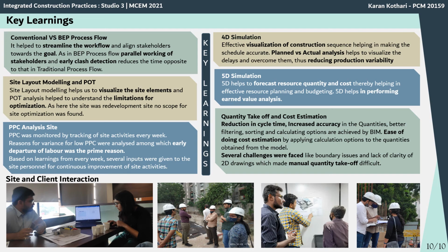However, our site couldn't be optimized; it was a redevelopment site. The PPC analysis was done, in which the main reason for variance was the early departure of labor. And based on the learnings from every week, several inputs were given to the site personnel for continuous improvement. The 4D simulation gives us the visualization of the construction sequence, and the plan versus actual analysis helps to visualize the delay and reduce the production variability.